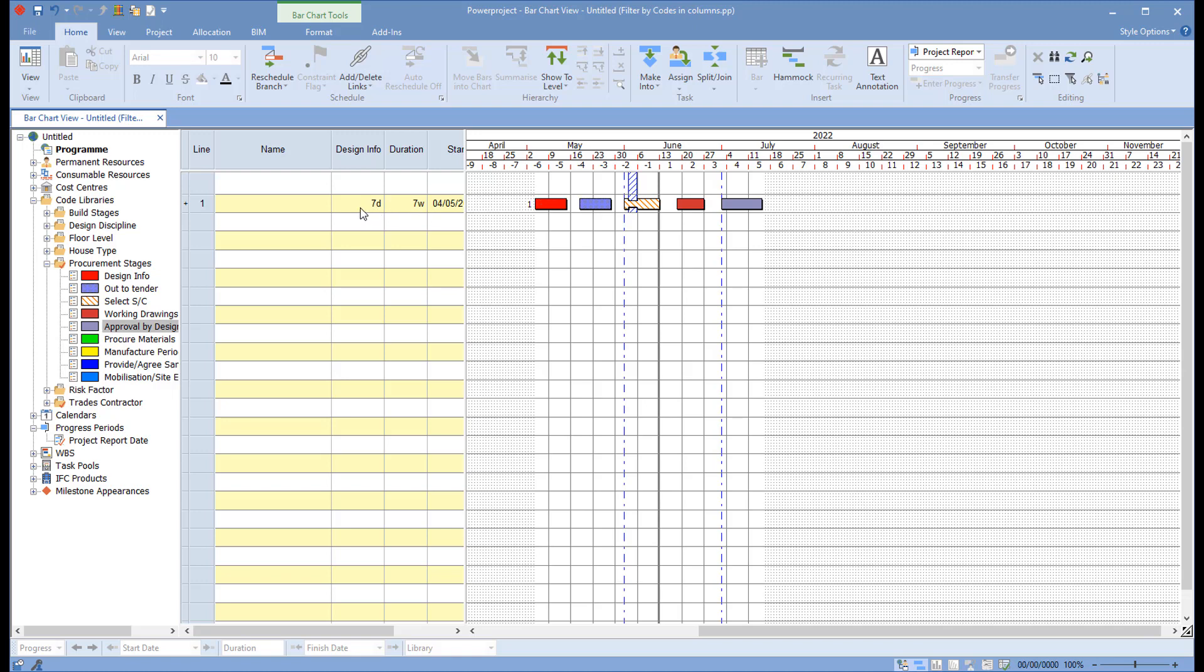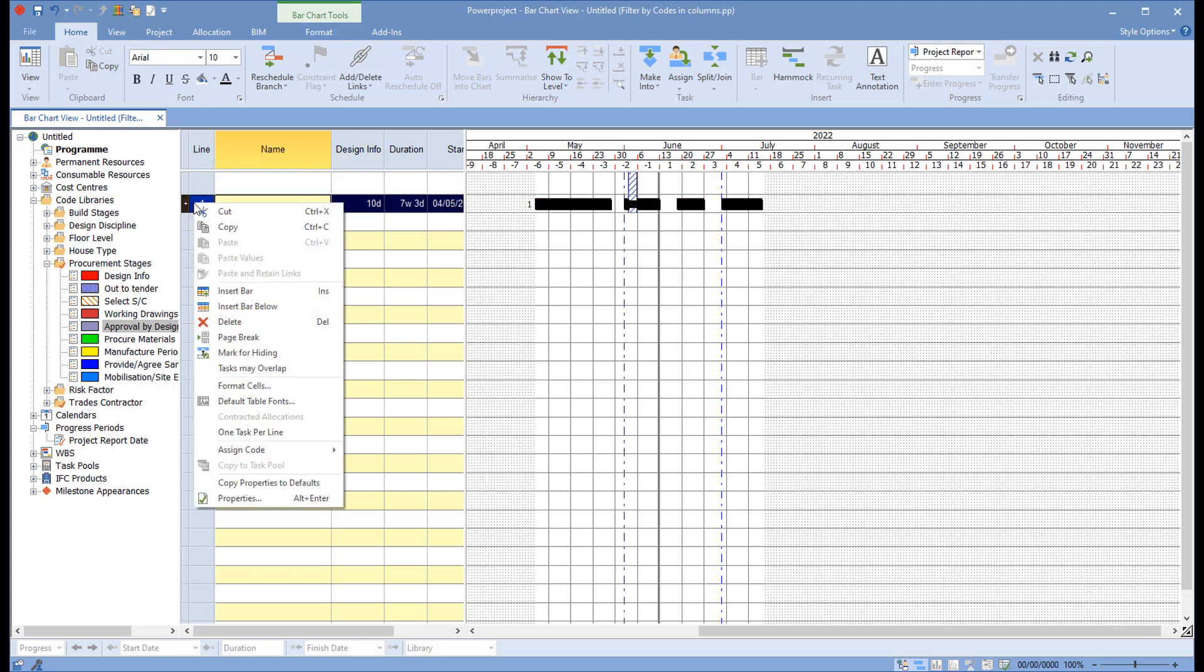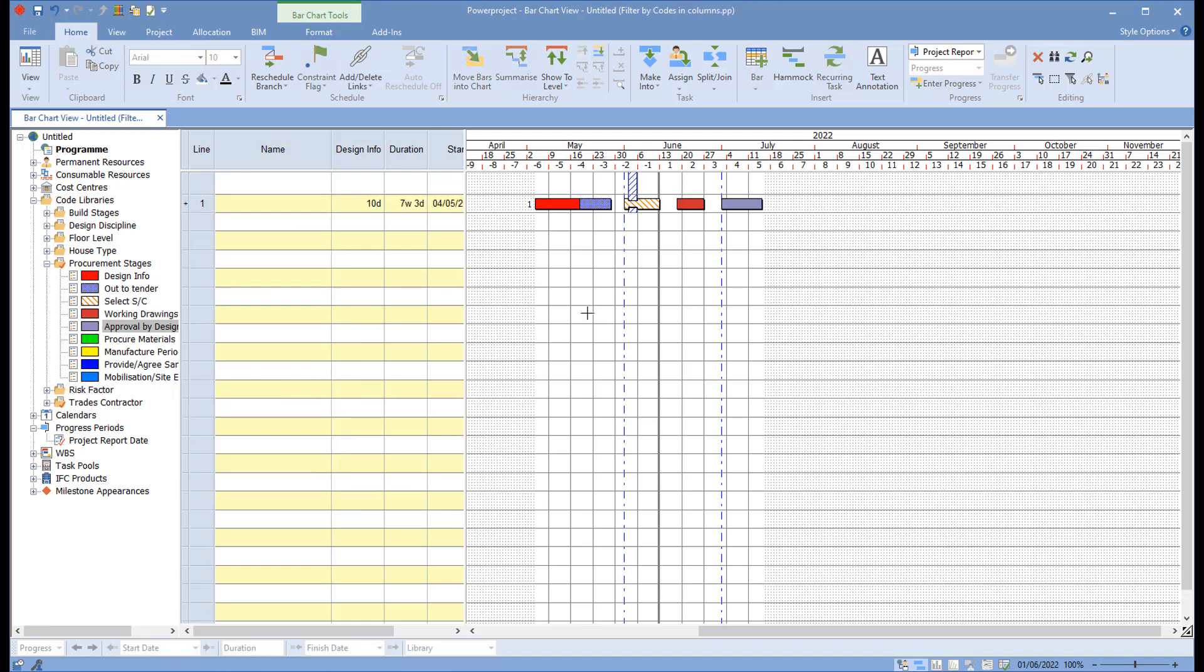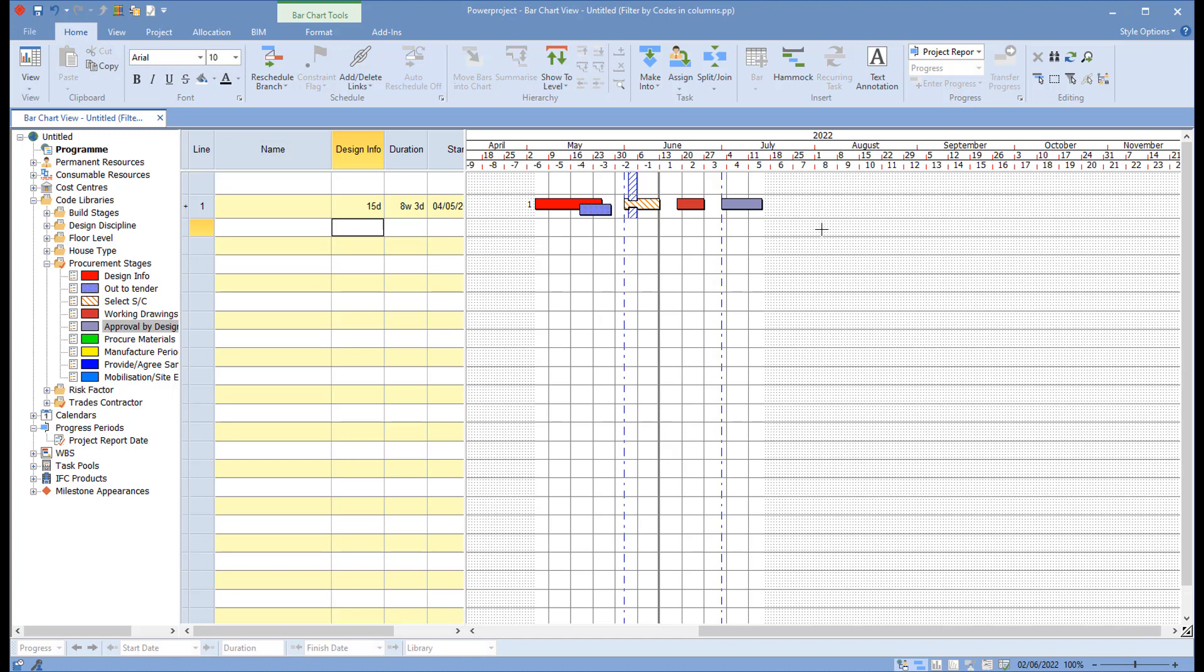I can also go in there and I can change that so I can make that ten days and it will increase it. And obviously if I've got multiple tasks I can just make them overlap. So if I do make them 15 days, you can see we've got that. But I could have a column for every one of my different stages for duration or start date or finish dates to allow me to see a procurement schedule in there.